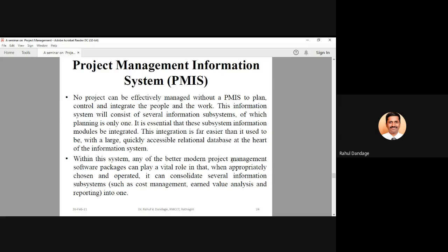In that particular case, it will be very difficult to integrate the things and carry out the things in the most effective manner. Let us say a particular material is required to be purchased, it is not in store, so it has gone below its level which is maintained in the stores, so now it needs to be purchased. So the person may need to send a requisition to the purchase department. Store in charge will send requisition to the purchase department that this particular material is not available.